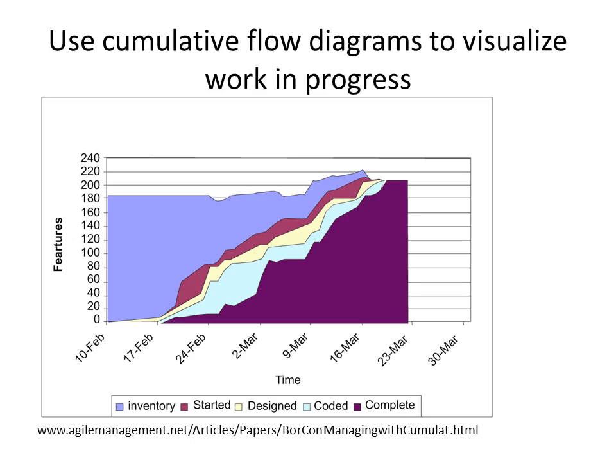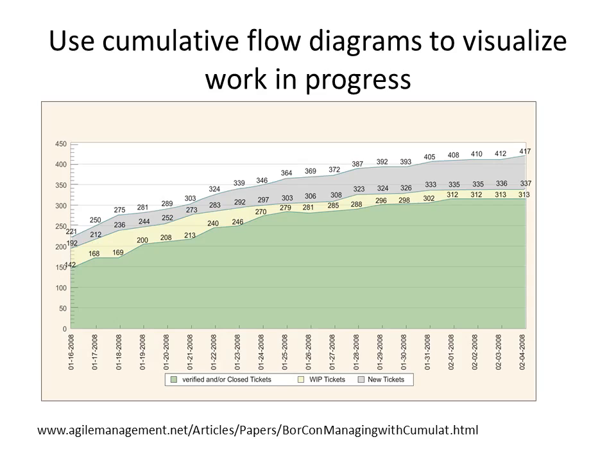This is a view of a cumulative flow diagram. It shows how much of the work is in progress and what has been done. This is another example. As you can see, the yellow, which is basically the work in progress tickets, is kept within about 50 or so points on a regular basis, while the one at the top is the waiting inventory of tickets that need to be worked on.